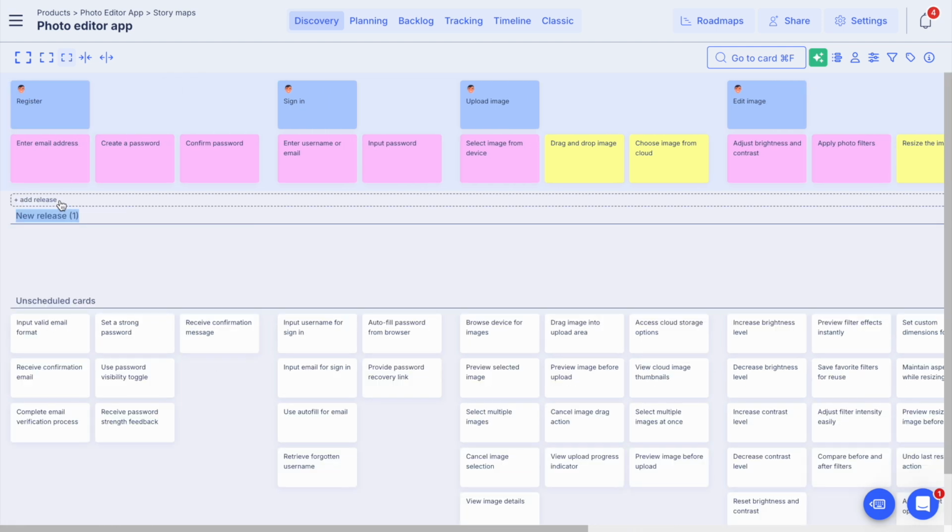Now that we are clear on the minimal journey that delivers value for our user, we also need to create our first MVP release. The next part is going to be critical. Now we also need to identify those user stories that we can enable through the developer team in order to fulfill those steps in the user journey and complete the goal of our user by interacting with the solution that we build. With our stakeholders, we need to make tough decisions and prioritize user stories in the backlog and decide what we will build first.